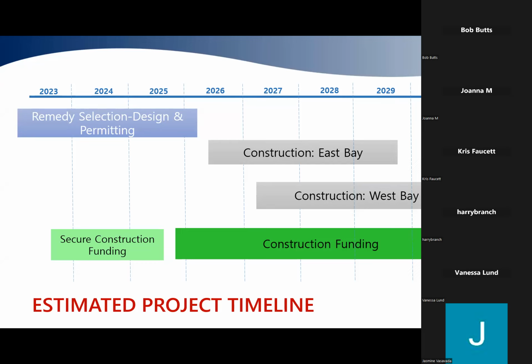If our project is getting delayed and instead of being able to start construction on July 15th, we're not going to be ready until September 15th, a lot of times these projects then get delayed a year because you need that full in-water work window to get enough work done to make sense. And starting halfway through the in-water season doesn't give you that lead time.